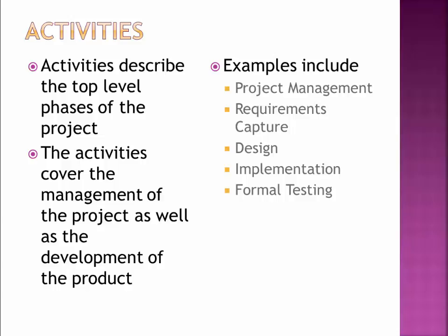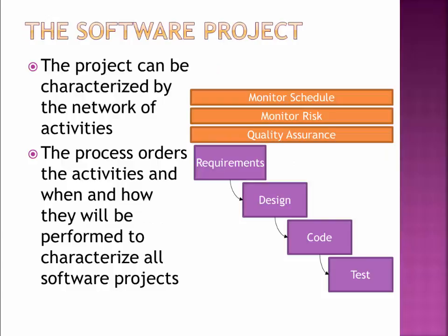Each of these top-level activities is probably the same across every project. We might do more or less inside of these activities, but this level of activities should ideally be the same on every project. By having those activities, it gives us a structure by which we know our projects are going to be conducted. Whether it's a small project or a big project, I know I'm going to have things like project management, the orange tasks over the top of everything, and then each of the purple boxes is the things I can flow in. Where they get scheduled and what little pieces are inside of them might vary. A web development project might be different than a database optimization project, which is probably different than a network optimization project. But in general, we want to define the requirements, design what we're going to do, implement it, and test what we've done. Those are high-level things to ensure quality.